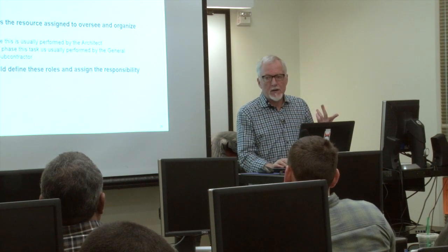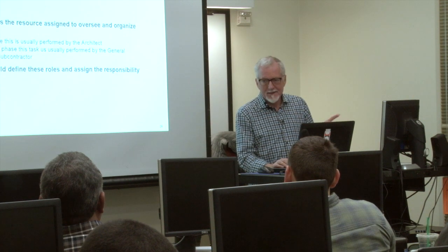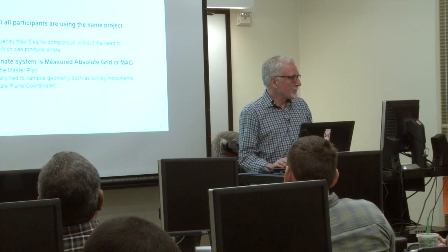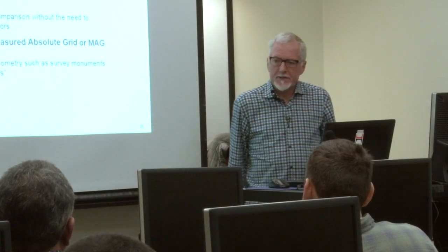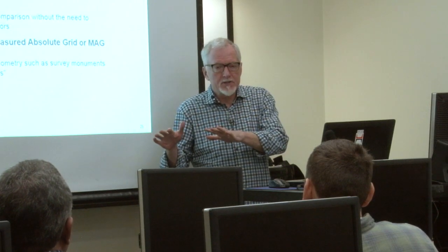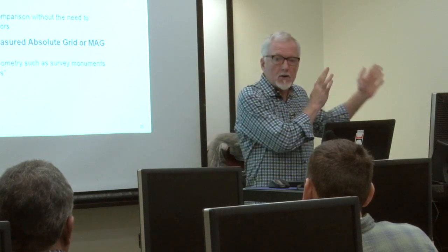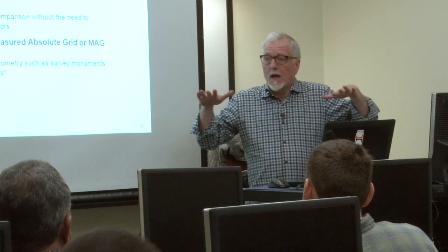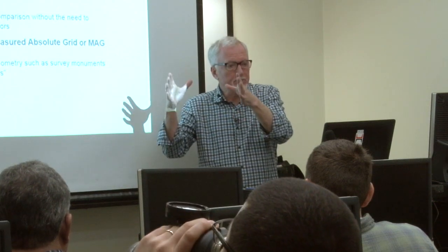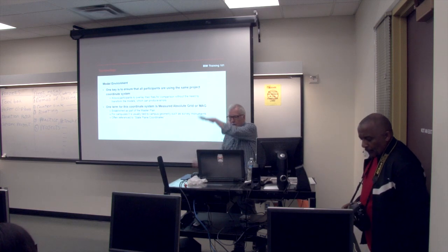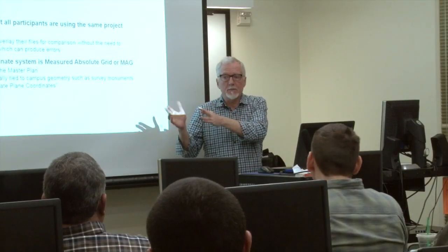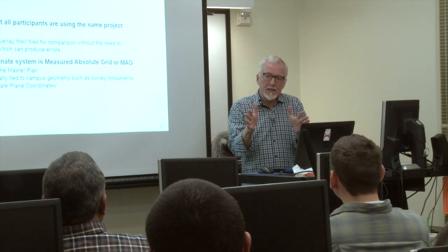So, we all know that term, measure twice, cut once. So we measure it in the model, and then we measure it in the field. And then we cut it. Or we cut it in the shop, and we measure it there first. One thing that happens is everybody's kind of working in a vacuum on many, many projects. The electrical engineer, the architect, the structural engineer, and our subcontractors are all working off in their own environments. We have to come up with a coordinate system that we all can agree on for where all these CAD files are going to land. Because if they don't land in the same XYZ coordinate system, we can't clash detect, we can't really see the relationship of, let's say, the plumbing file and the electrical file. We have to be in the same place.